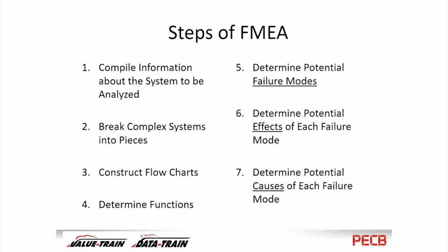And then for each one of those, we determine failure modes. So this can be tricky. So it's important to have people on the team who are aware of ways in which things can fail. And some of these are just common sense, and others are very technical. And they may not be common sense at all. But we'll make a list of failure modes.